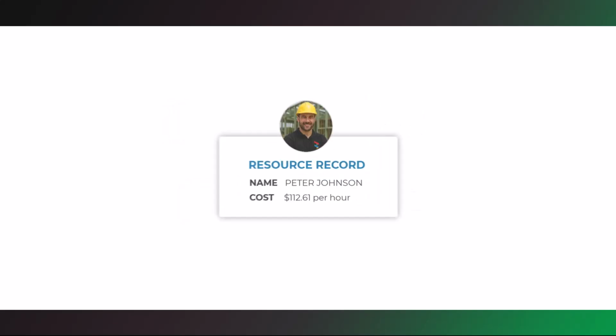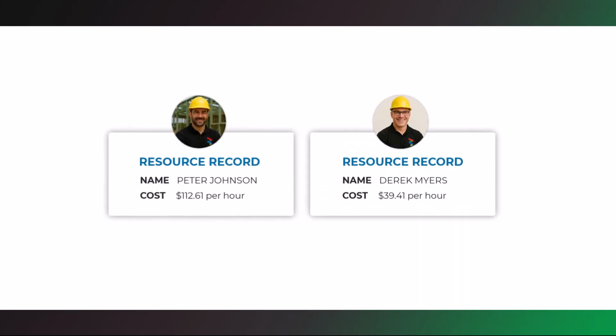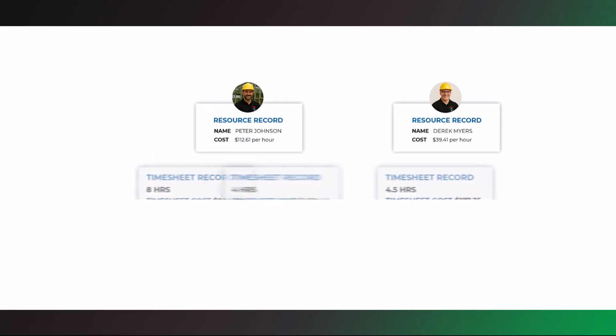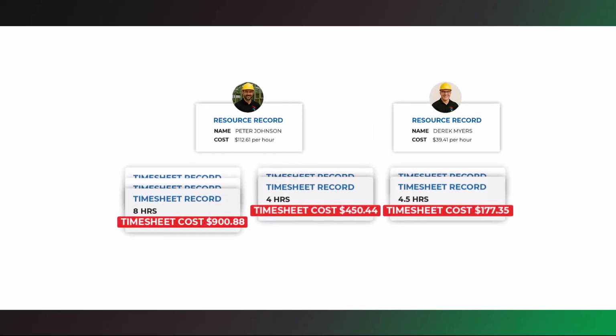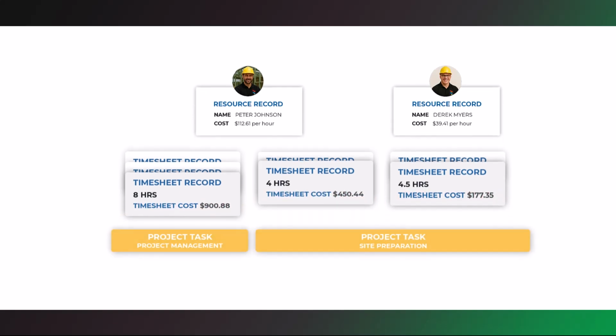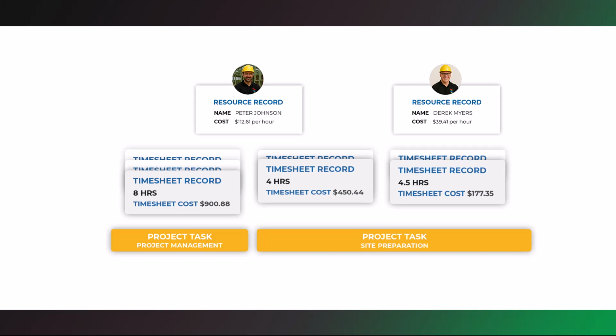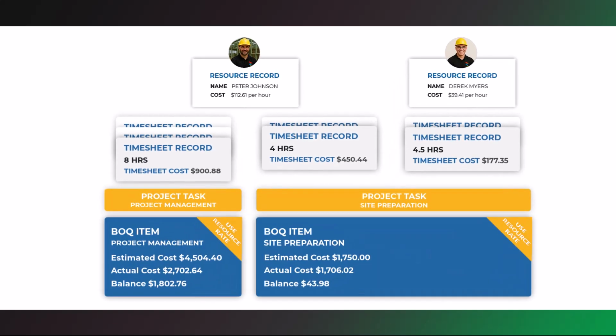In this video, Peter Johnson is our project manager with an hourly cost of $112.61 per hour. This cost is based on our earlier calculations. This cost is assigned to each individual under their resource record. When timesheets are entered, Builders Excellence calculates the actual cost of labor by multiplying the timesheet's hours by the resource cost. Timesheets are entered against project tasks, and project tasks are linked to the BOQ items on your estimate.